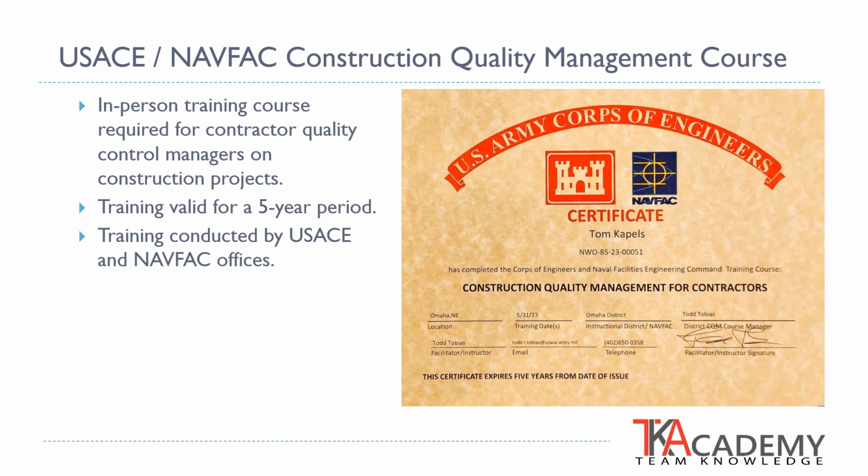On U.S. Army Corps of Engineers and NAVFAC projects, the contractor's quality control managers are required to attend the Construction Quality Management for Contractors course. This is an in-person training event covering the quality management program. Only individuals who have completed the Construction Quality Management for Contractors course are allowed to be in the position of a quality control manager for a project. Once complete, the training certificate is valid for a 5-year period. Contact your local U.S. Army Corps of Engineers or NAVFAC office for the availability of training courses.